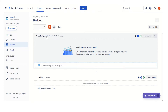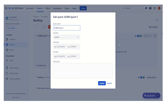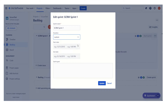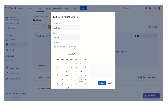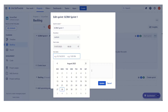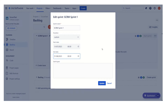This is going to be our Sprint 1. We can click on 'Add Dates' to define our very first sprint. We have different duration options: we can keep our sprint at one week, two weeks, three weeks, or four weeks. Because this is the Scrum process, the sprint duration cannot be more than four weeks or less than one week. We will keep it custom. Let's say the team wants to start the sprint from Monday, which is 31st of July, and the sprint will end on 11th of August.